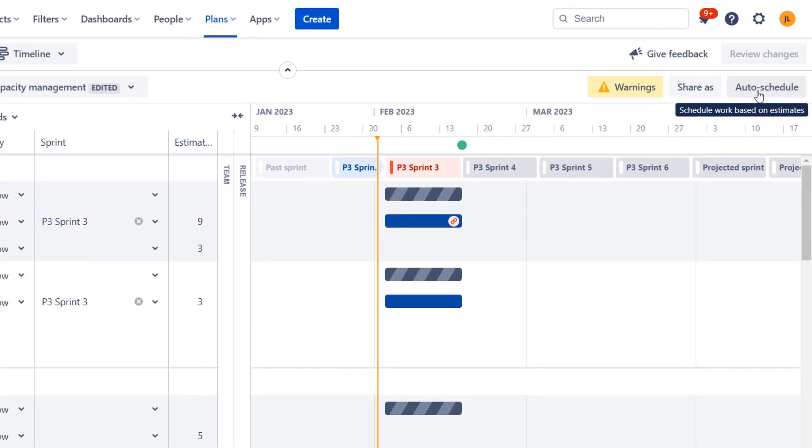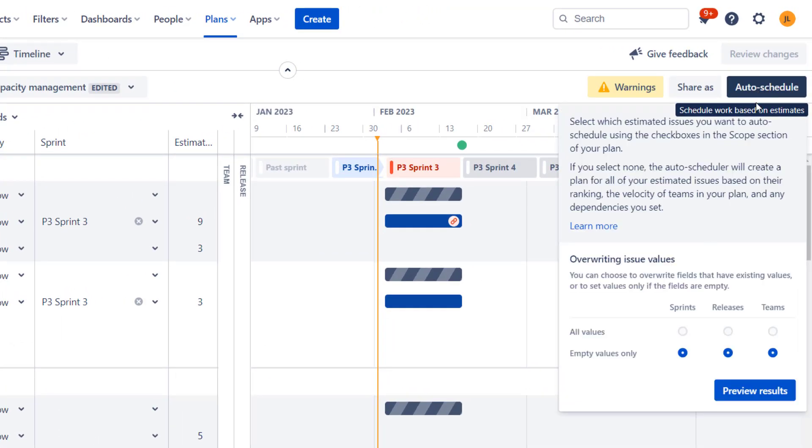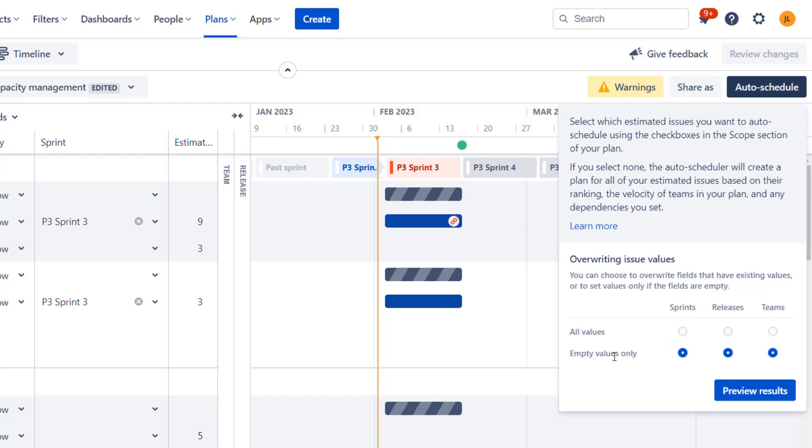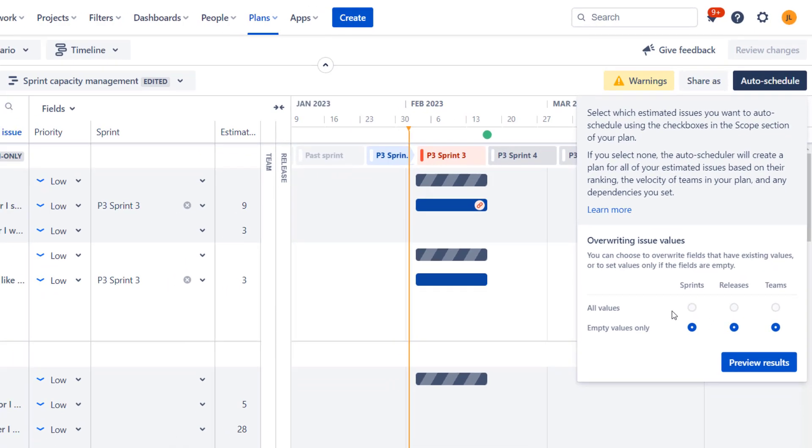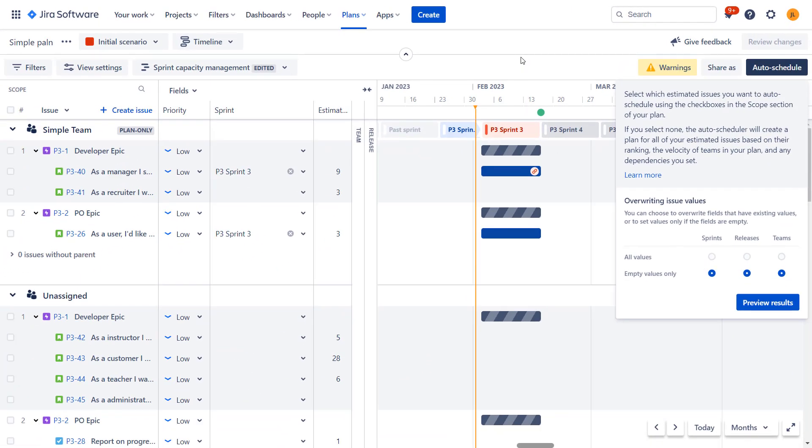So auto schedule, as you may have guessed, will try to schedule issues in our plan. And when you click over here, you can see that it can take into consideration and update actually several fields, sprints, releases, teams. So here we can decide whether we want auto schedule feature to update only issues and fields that are empty or also the ones that have values. So basically if you already did some planning and maybe you just want auto schedule to plan issues that were not yet planned that are further in the future, you stick to empty values only. We'll cover both of them, but that's the safer way. And if you want to have the full plan build from bottom up, you can go with all values.